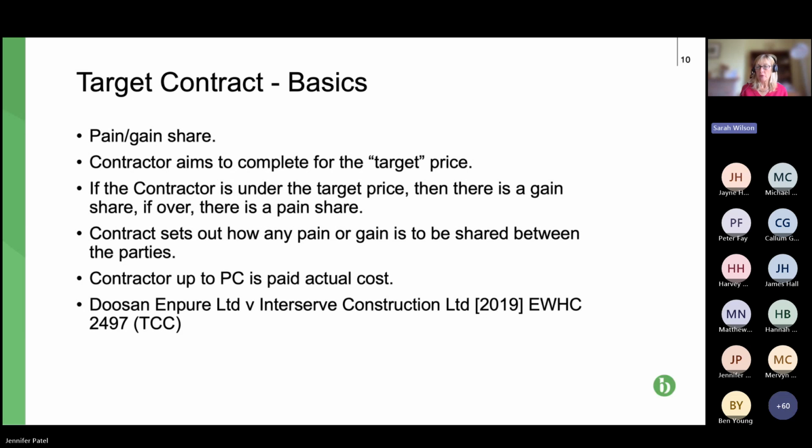So by reference to the schedule of cost components, which states what you're able to claim, there are checks and balances, so that the paying party is only paying for efficient work, for example. So how it works is the contractor is paid on that monthly, or interim, basis on a reimbursable Option E basis until you get to practical completion.